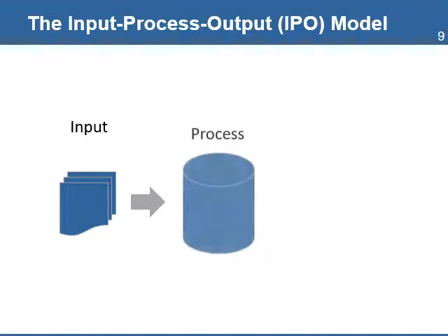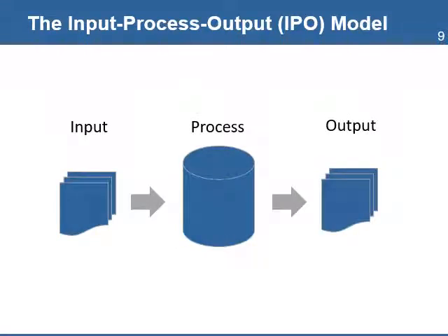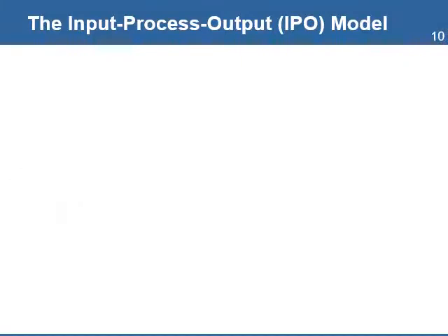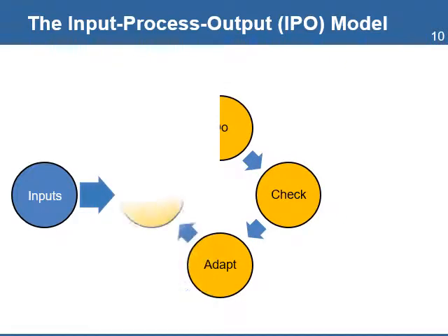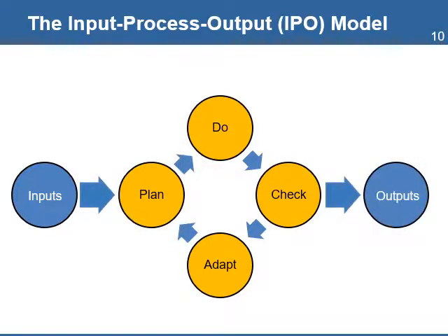In process management, each process will consist of 3 elements: the inputs to the process, the process to manage the work, and the outputs of the process. Each process is dependent on the inputs that are available to define the scope and objectives of the process outputs. The Input Process Output model, or IPO model, is used in project management to identify the information, constraints, and policies that regulate the processes and determine the type of outputs the process can produce. The IPO model is a simple method to define how the project management processes can identify the required inputs to produce the expected outputs.